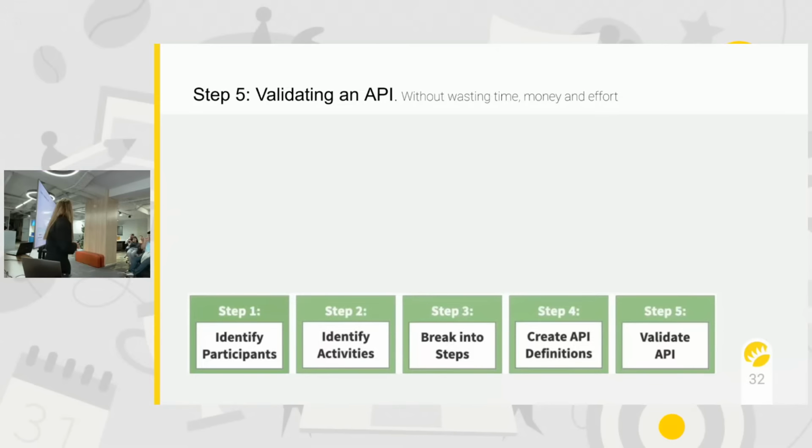When we get the requirements, we do analysis, prioritization, benchmarks, and maybe we use some models like MoSCoW, Kano analysis, etc. And we have some documentation, and we need to verify them with stakeholders.